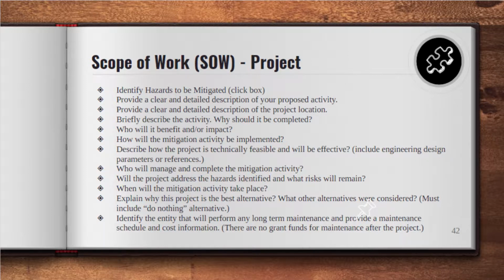And when you say that activity, you don't have to give us exact dates. When we get to the schedule, you're not going to say we're going to start in April of 2019, because we don't know. As we mentioned, we don't know when you're going to get the grant. But put things in there like we have to do construction over the summer because we're in northern Utah and our construction period is between these months, and it will take 2 summers to complete this, and so we'll complete it within 24 months of when the grant is awarded. That's the kind of information we need in there.